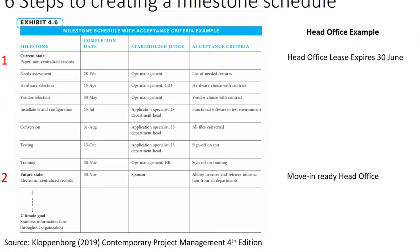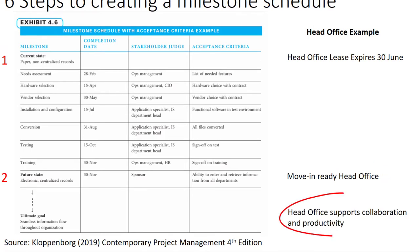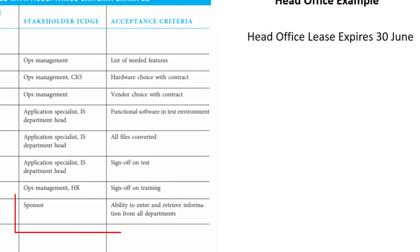In our second example, we have a move-in ready head office, and the head office supports collaboration and productivity. Then describe the acceptance criteria for the final project deliverables. The acceptance criteria signifies that this milestone can be signed off by the stakeholder judge, so it should be specific and easy to recognise.